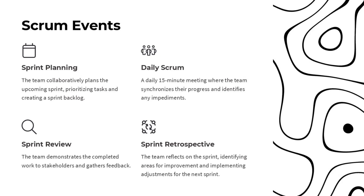The Scrum framework consists of several key events that help the team stay aligned and continuously improve. First, sprint planning is where the team collaboratively plans the upcoming sprint, prioritizing tasks and creating a sprint backlog. Next, the daily Scrum is a short 15-minute meeting where the team synchronizes their progress and identifies any impediments or blockers. The sprint review is an opportunity for the team to demonstrate completed work to stakeholders and gather feedback. Finally, the sprint retrospective is where the team reflects on the sprint, identifies areas for improvement, and implements adjustments. Each of these events plays a crucial role in keeping the team focused, transparent, and continuously improving.